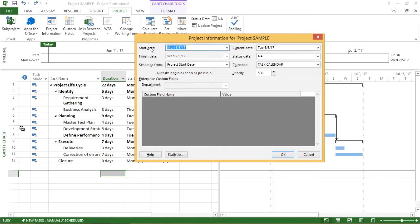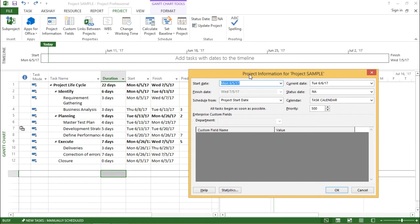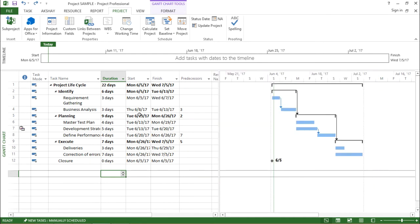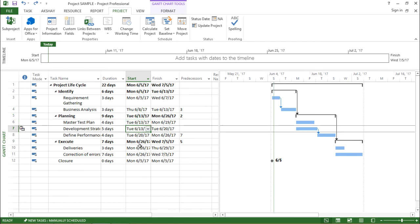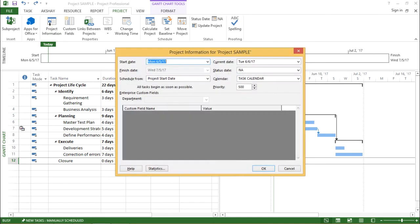Now what is the start date? Let's see that as of now, the start date for this project is from Monday. But for some other reason, the start date shifts from Monday to Wednesday. So if I want to make the changes, if I do it manually, it will take me loads of time as I have to go through each and every task. So in order to make the changes for all subsequent tasks, I will use this start date.